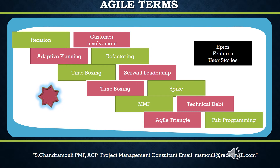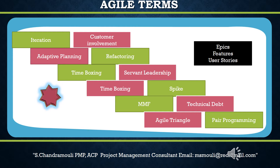Let's look into some of the agile-related concepts, predominantly used in all agile methodologies. First, iteration: the ceremony in which working software is produced in an agile project is called an iteration. Working software is produced at the end of the iteration and used as the starting point for the next subsequent iteration. An iteration demo to the customer happens at the end, followed by iteration retrospection, which helps to improve the next iteration cycle execution.